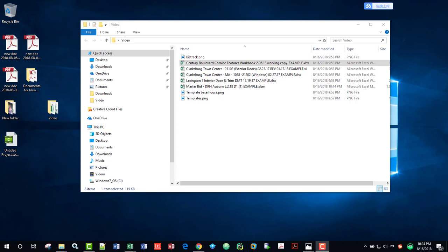I also generated subcontracts for framing labor, interior and exterior installation, because Annandale outsources this installation job, and those prices are based on the square footage of the house or how many windows and doors need to be installed for each lot.